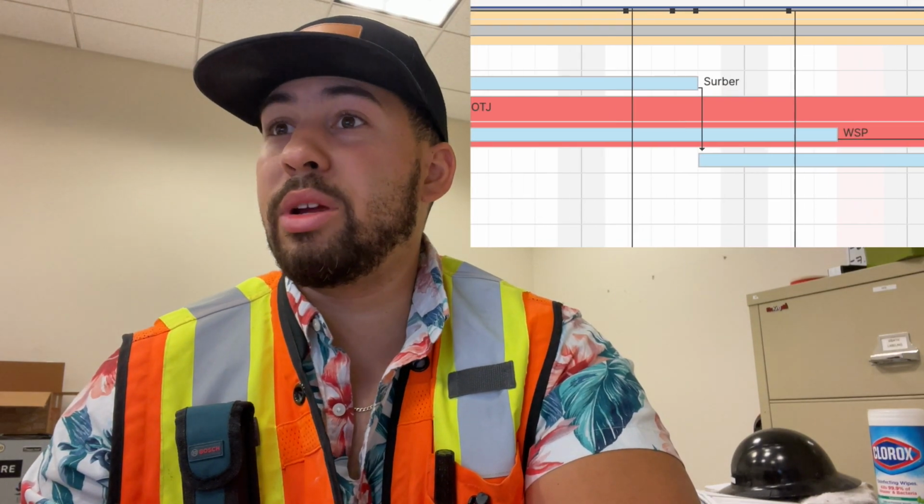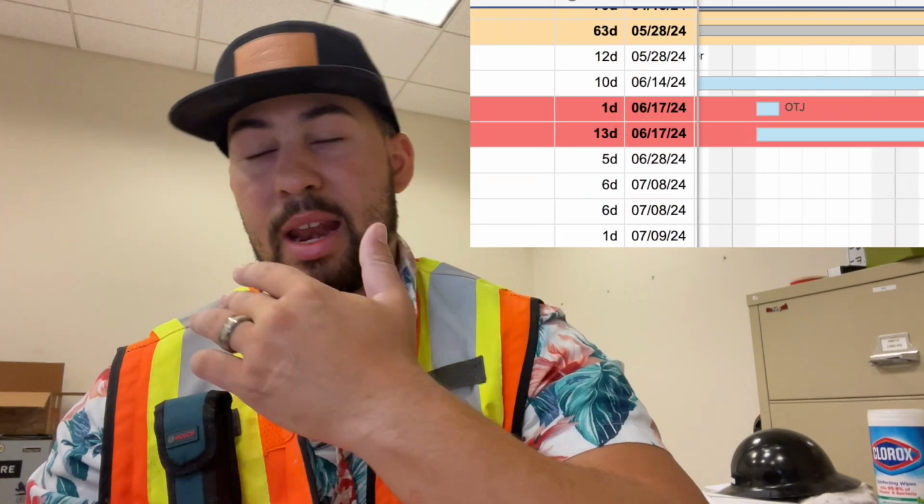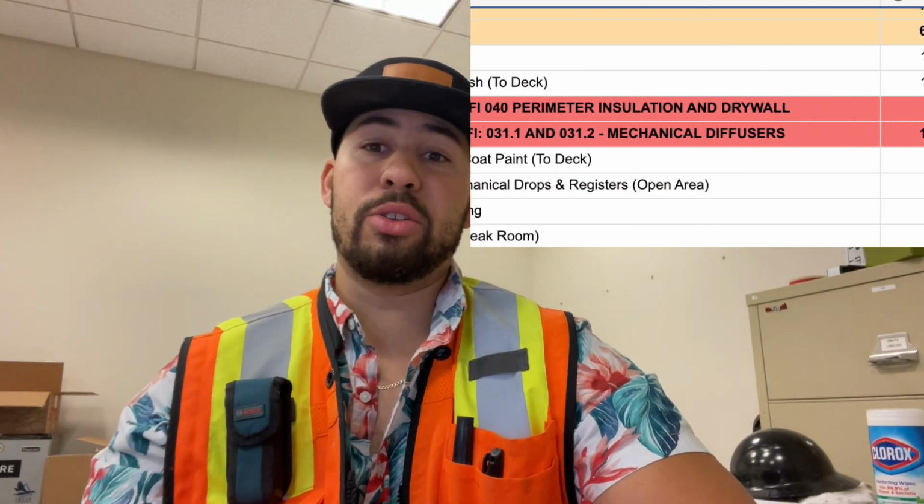And so I have certain impacts that you'll see, for example, an RFI response, or I have 63 days waiting for a change order approval because they just cannot make a decision on what they want to do with the data scope on this project. We had to wait 17 days to approve drywall buyout because there were just so many different changes. So at the beginning of this project, especially for the lab portion, it was going to be all ceilings. Everywhere was going to have that lab grade ACT grid system. And everyone thought that's what the owners wanted.